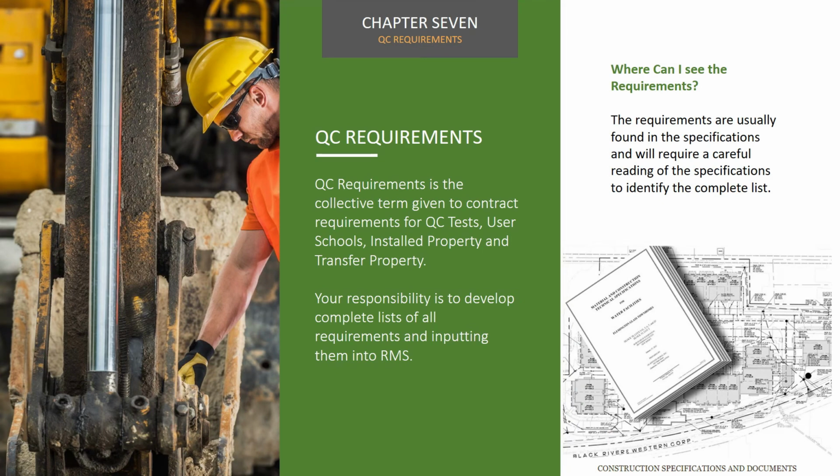QC requirements is the collective term given to contract requirements for QC tests, user schools, installed property, and transfer property. You are responsible for developing complete lists of all these requirements and inputting these into RMS3. The requirements are usually found in the specifications and will require a careful reading of the specifications to identify the complete list of QC requirements.